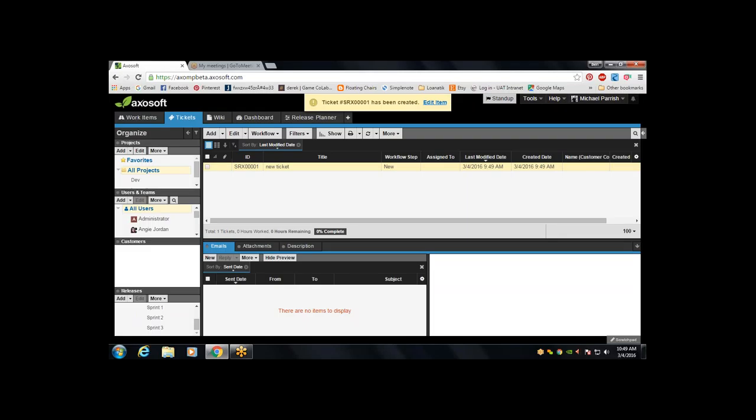An example of this is teams that do segment their defect tracking, because with larger companies, they might have a dev staff that actually has a team managing bugs, and they've got that dev group, and they've got their developers that are working on enhancements, and so they've got that team. So overlap some don't. But in any case, each team's working on their workload, and then individually a scrum master or product manager will actually pull their work into the sprint separately and then give them one consolidated view of all of the effort. But that's typically managed by an individual that wants to say, I am consciously pulling this work into this sprint because we can afford to have this much work in this sprint. So it's not just randomly pulling it in there.